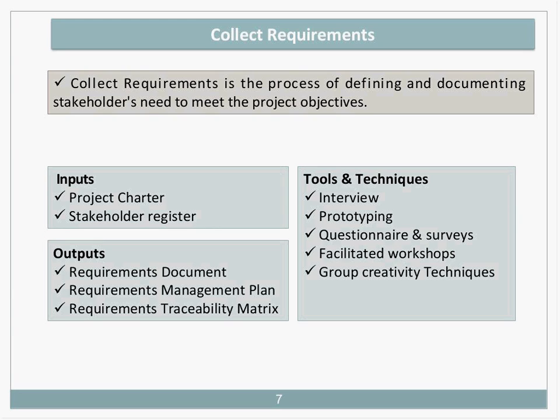Group creativity techniques that we can use include Delphi. Delphi is where we try to get the people to work separately and independently, and brainstorming would be where we get the group to think together, so that the result is more than what each individual part of the team would have come up with.